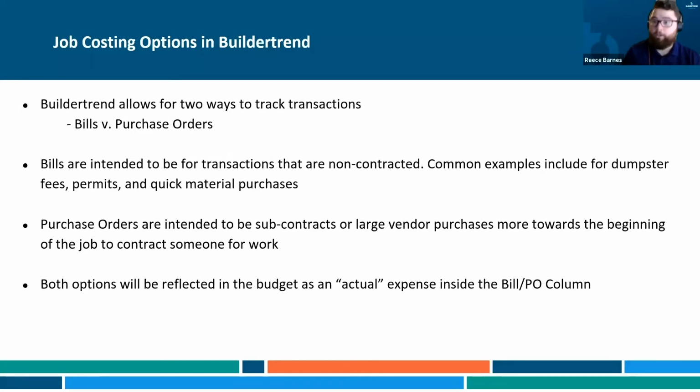Overhead. Buildertrend, let me assume, is going to be more so how are we making money from a business standpoint being our projects. Exactly. So it is a little bit more of a micro view as far as how I'm looking at this particular job and the costs that are associated with this job. Now, if you've gone full in on putting your estimate into Buildertrend, you're actually halfway there. You don't even realize it because your estimate is your budget.